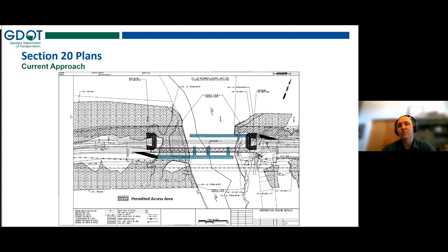And if we moved those at all, that meant that we had a lot of work to do. On the environmental side, that meant that we were potentially changing the amount of impacts. We were certainly changing the location of impacts, which can be a really big deal. On the ecology side, if we've got say a mussel bed there, or on the archaeology side, an underwater archaeology site, the placement of those structures is really important.